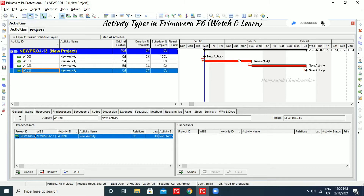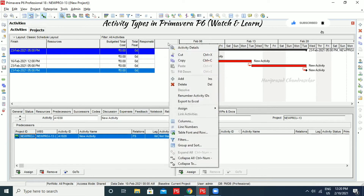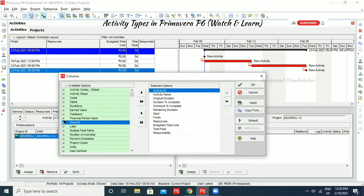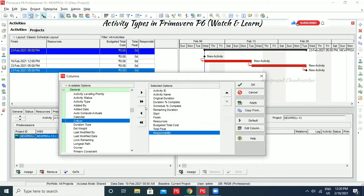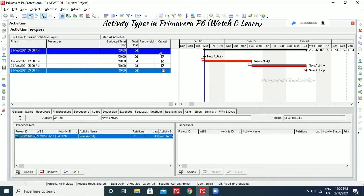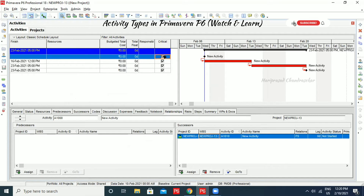Now we can see the red color activity — we call this the critical path. This is the path we should take care of for our project to be successful. If there are any delays or lags in this critical path, it will affect the whole project. We can right-click, go for Column, go for General, add the Critical column, and click OK. Then it will show which activity is critical. Now everything is critical because we only have 4 activities. It is based on the scheduling.